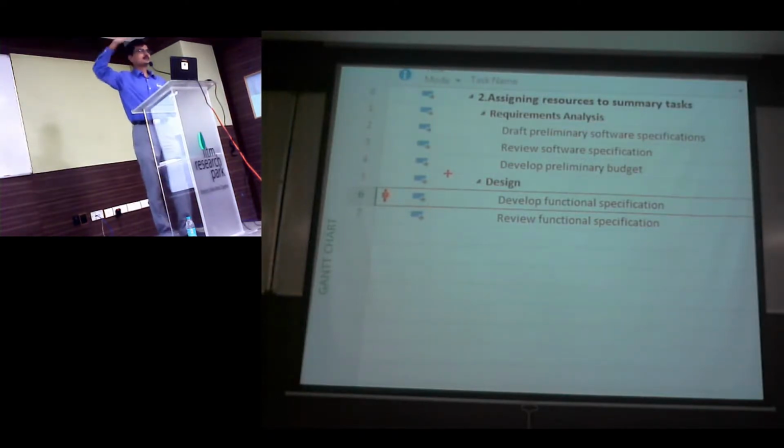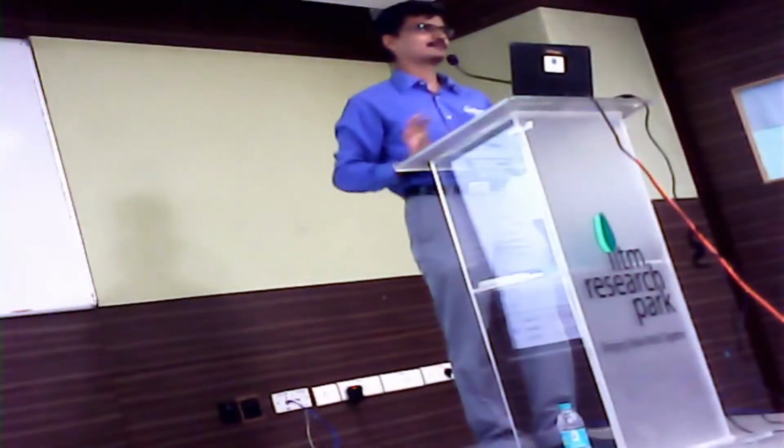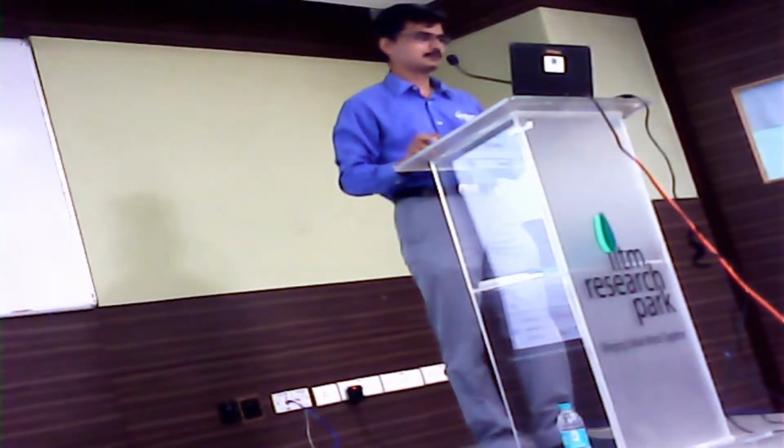Any questions about resources? One more thing, can you have public holidays also in the calendar? Yeah, you can do it, sir. But I would say project is very bad in that, okay? Because for every holiday, you need to make an entry in exception. Rather, we can write a macro that can read an Excel file and import it automatically. I'll show you that part towards the end of this one. Okay, but that option is available, but you need to know what a macro is and how to run it.